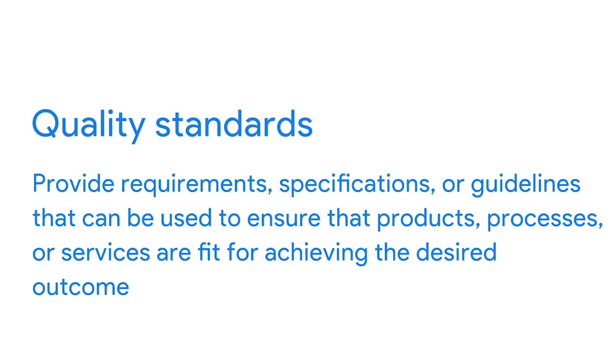The quality process begins with setting quality standards. Quality standards provide requirements, specifications, or guidelines that can be used to ensure that products, processes, or services are fit for achieving the desired outcome. Set quality standards with your team and your customer at the beginning of your project, and define the criteria clearly so all team members and stakeholders understand them. Well-defined standards and requirements lead to less rework and schedule delays.